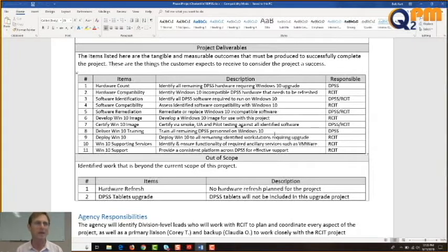So that's where the time went. And we actually had 2 phases of the pilot. Just to break on that, what we want to do for this is have 2 phases of the pilot. It's 6 months, but phase 1 is a limited group, and then we're going to expand it to a much larger group in phase 2. Again, mitigating our risk.